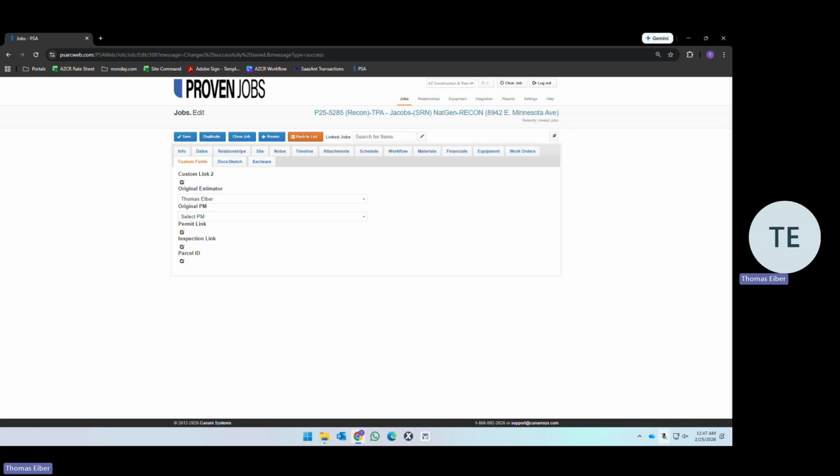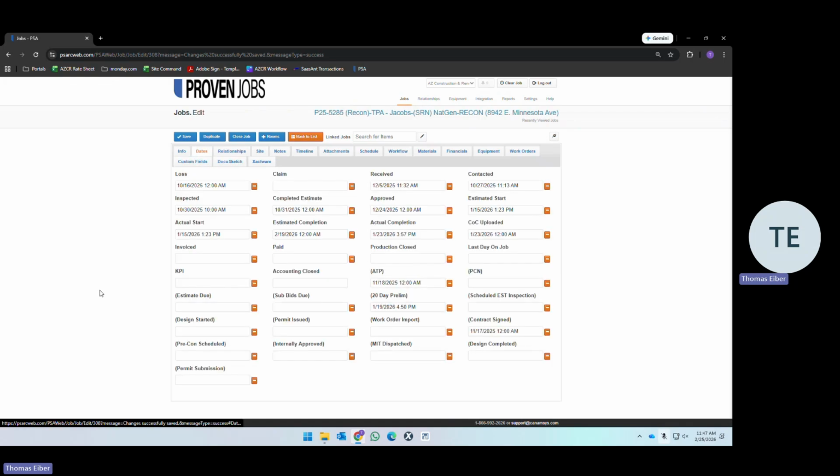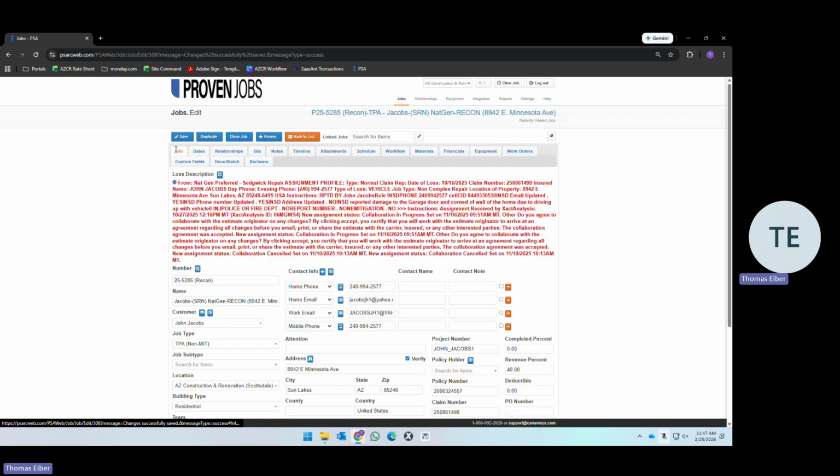Once you inform them, they should fill in the date that that has been uploaded, and it will progress the workflow automatically. The workflow is based on dates. Project managers do not enter dates into PSA. You have access to see them. You don't have access to edit any of these. Operations gets informed and they edit the dates. A lot of these push out to our portals and they are very important and meaningful when they're filled in. An accidentally entered date could cause a lot of heartache for our administrators. So you provide updates to operations, they provide those externally.